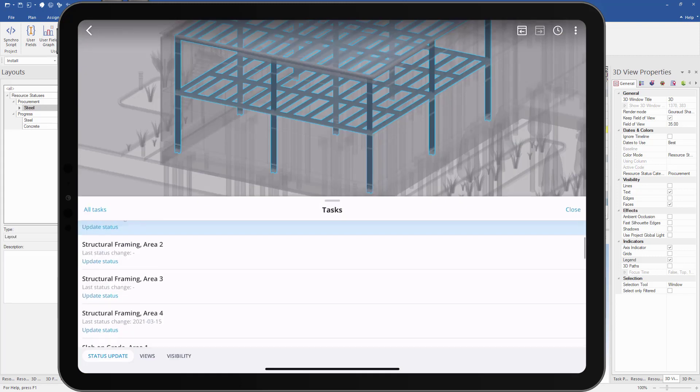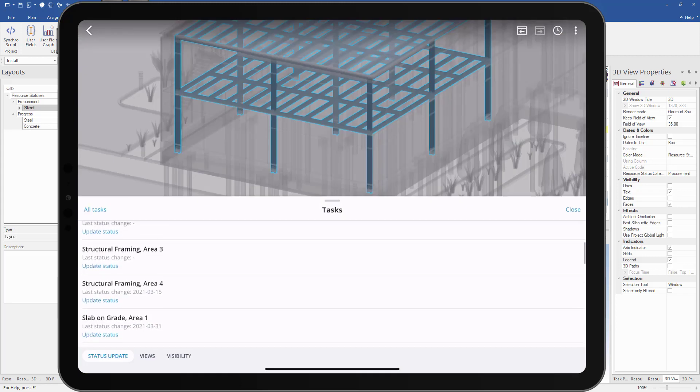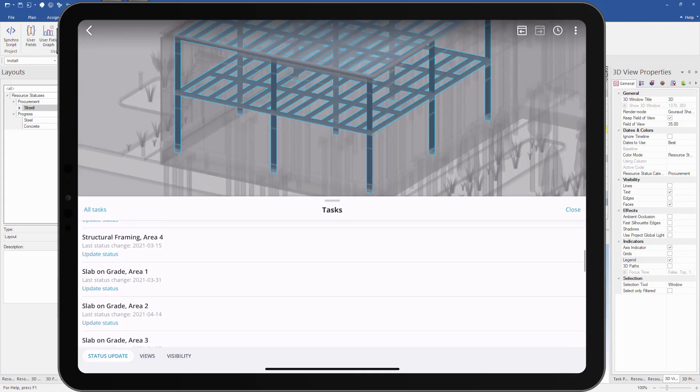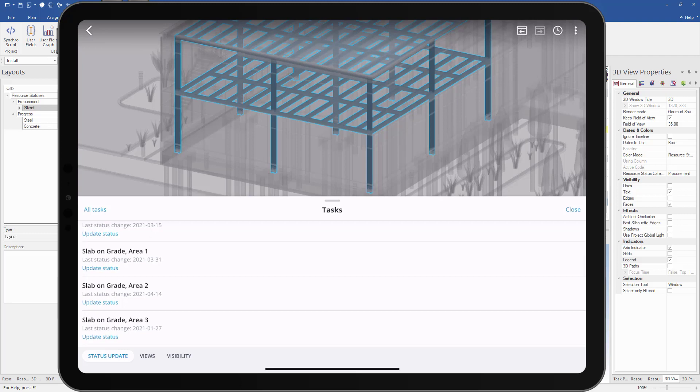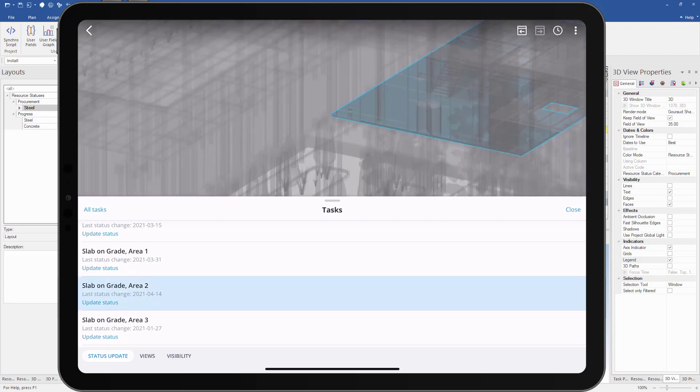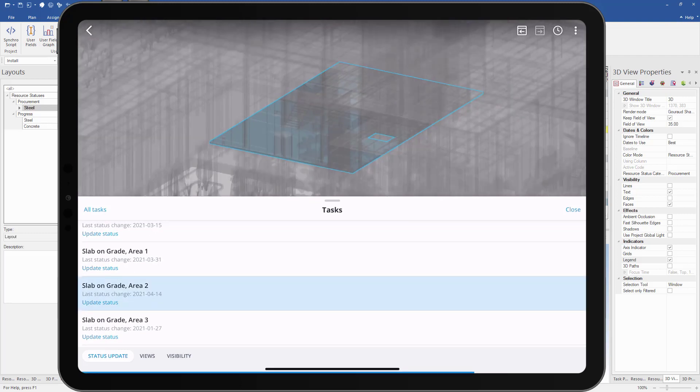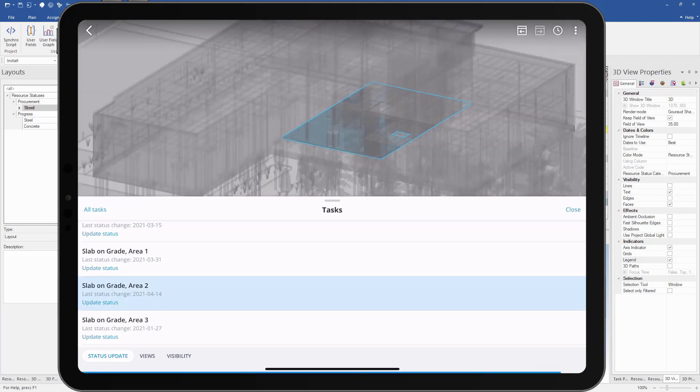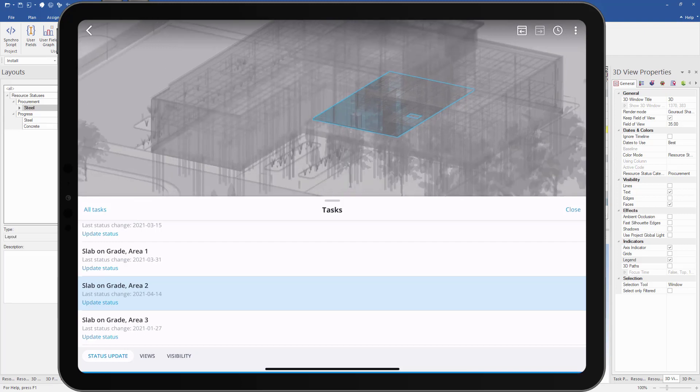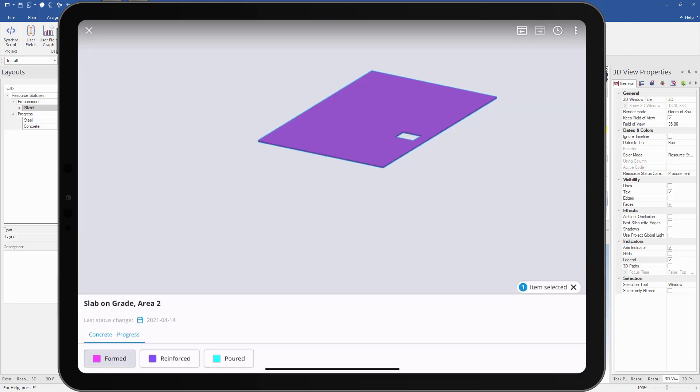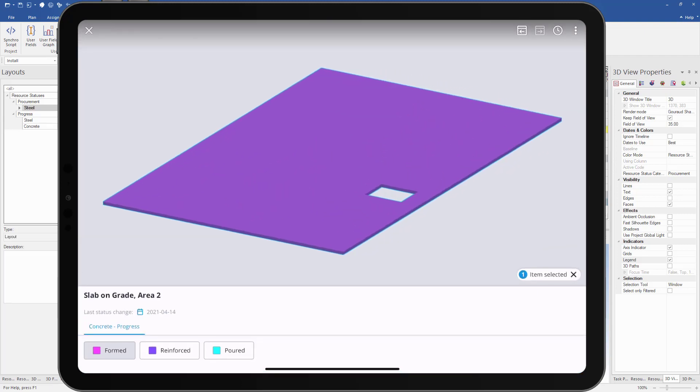Next, we can update the progress of our concrete. We can scroll down to our slab on grade area two task and we can see the assigned resources are highlighted. We can see the concrete has been formed, so now we want to update it to reinforced.